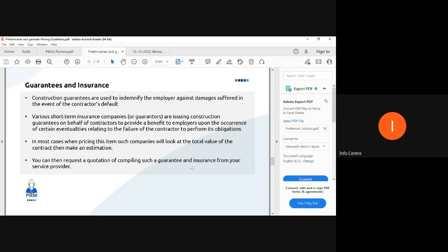If the contractor truly had budgeted for this, and now they're disputing it, one of two things is potentially happening. One, maybe they lied about insuring the works, but they claimed for it. Or two, maybe the insurance excess is quite big, the excess amount that is required before the claim is run, so therefore they can't afford it. So they're trying to find a way of making us, together with our client, pay. And we refused that because we know that the works have been covered under P's and G's, specifically guarantees and insurances.